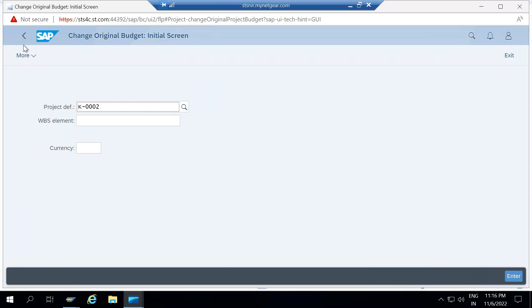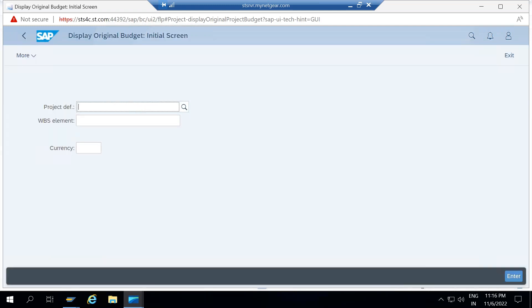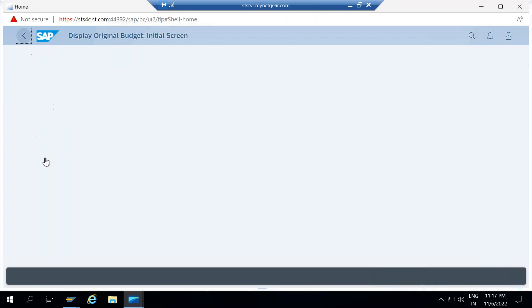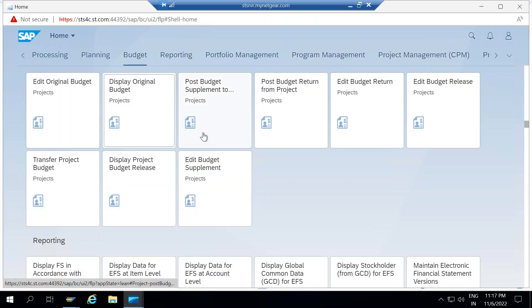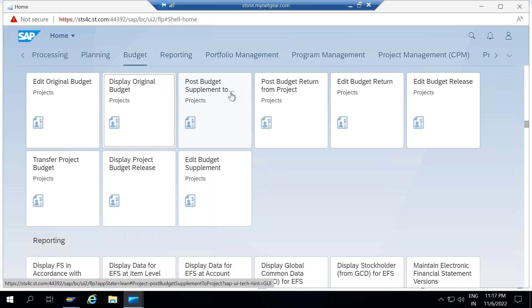If you want to display the values, you can use another app — Display Original Budget. You click here and enter your project number. If there is no value planned there, it won't show anything; otherwise it will show you the complete values. The next transaction is Post Budget Supplement. So Edit Original Budget is CJ30, Display Original Budget is CJ31, and Post Budget Supplement is for supplementing the budget to the project.